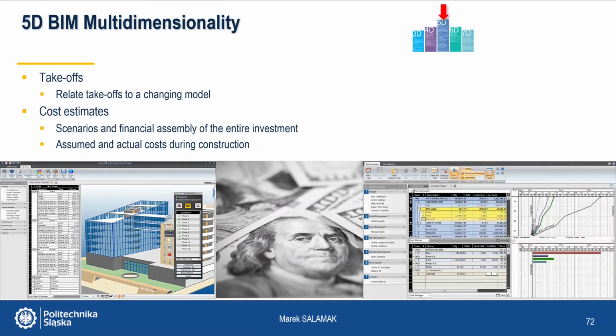The 5D dimension includes takeoffs that can be linked to a changing model and cost estimates. We can create scenarios and financial montages for the entire investment. We can compare the assumed and actual costs during construction.